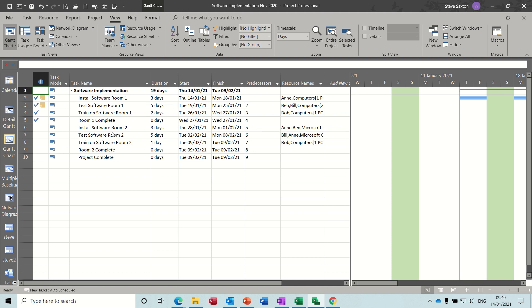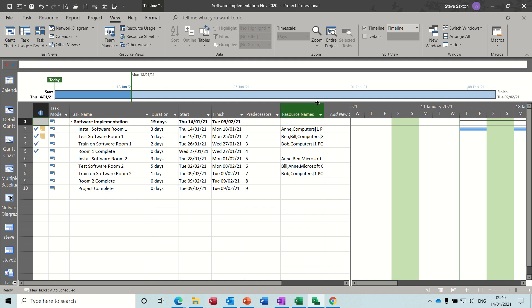Hi guys, welcome to this session on Microsoft Project. In this module I want to have a look at the timeline and what you can do with it. I have a project plan on the screen but no timeline showing. To activate the timeline you need to be on the View tab and tick Timeline, and then you'll see it.